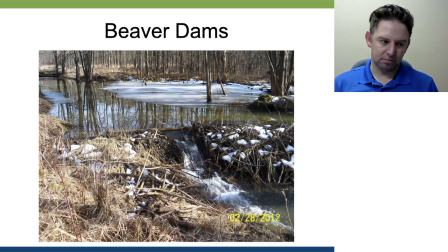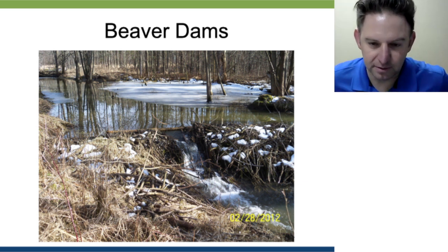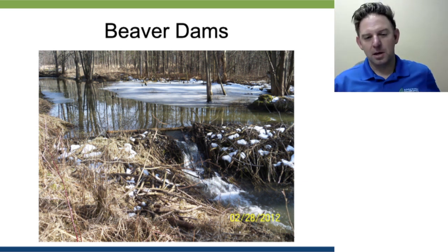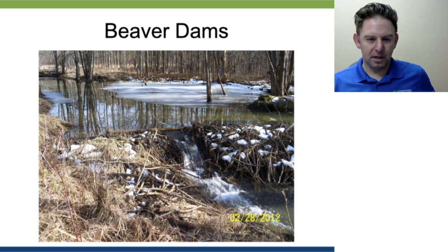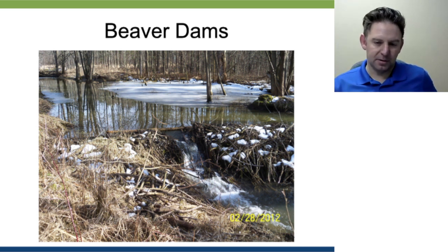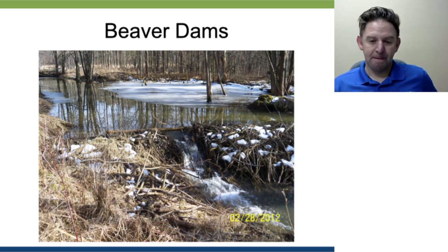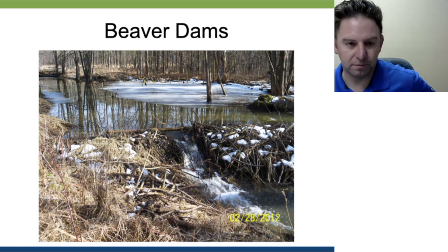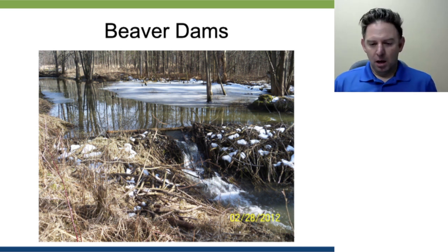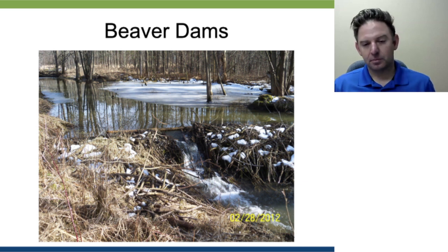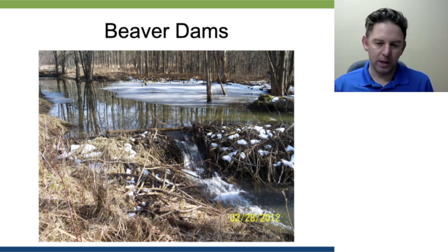Beaver dams, you'll get to enjoy beaver dams as drainage superintendents, no doubt. They can happen individually, or in this case, there were 13 beaver dams on this drain, all within no more than 400 or 500 meters. One of the biggest things with beaver dams, though, is removing them slowly. So it's taking a little bit out of the center here, letting the water come down, coming back, lowering it again. It's something that's done over time. It's not something that's done real quick.